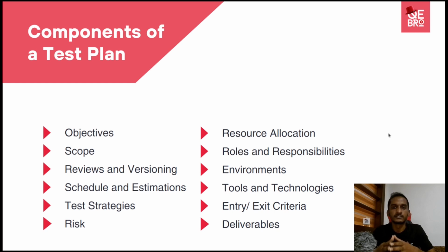And again you need to mention the tools and technologies as well, because then the project managers also know whether they need to get any license and everything, or make the environments ready. And also if there are no engineers with the knowledge of using these technologies, either they can hire new engineers or else they can provide some training to the existing engineers. Those things they can plan beforehand if you clearly mention these tools and technologies. And then again, we need to mention the entry and exit criteria as well.